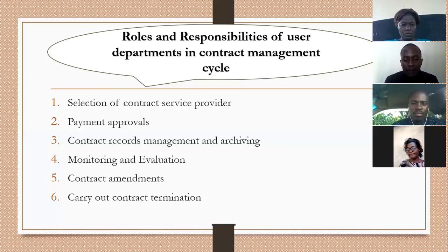For example, in the construction industry, it can be done through site meetings, monthly progress reports, and also through tests, for example material tests and finished section tests.